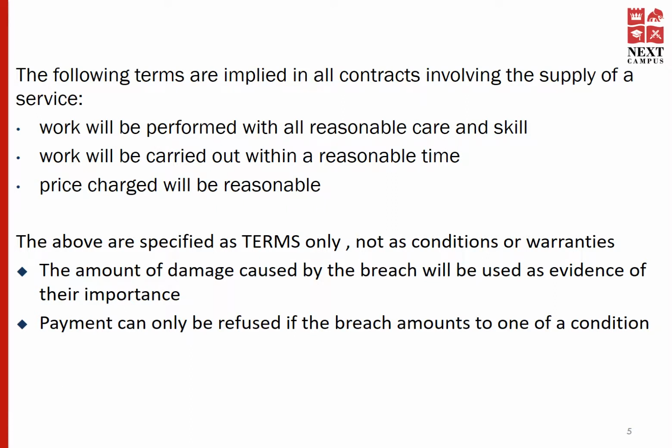And therefore, the amount of damage caused by the breach will be used only as evidence of their importance. Also, we need to make sure we understand that a payment can only be refused if the breach amounts to one of the conditions only, not for implied terms.